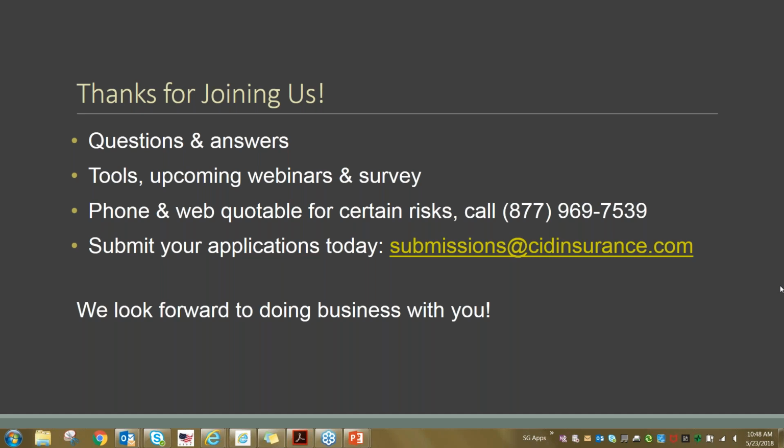But like I said, the builder's risk policy is not an endorsement, it's an actual policy. That will be needed when you're doing $250,000 or more in renovation costs, or more than 20% of the building value in construction costs, or if it's ground-up construction. So I hope that answers your question.